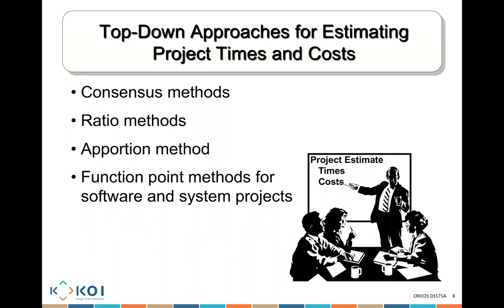So you could use one ratio. I will have 100 square meters in this home, and it's $100 per square meter. Or let's say in software, you have 4 modules. Every module will cost you $50,000. 4 modules will cost me $200,000.